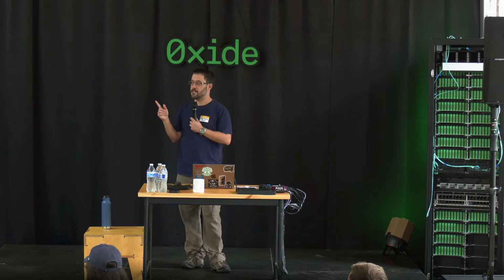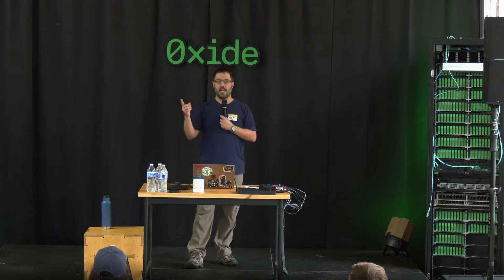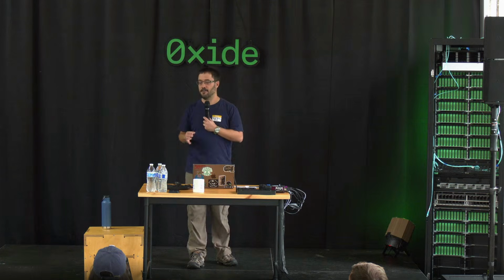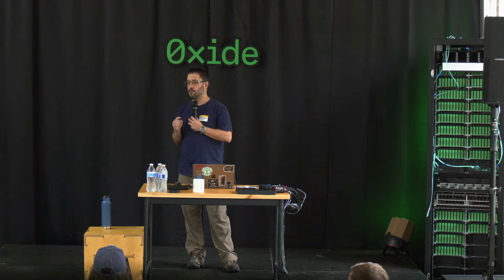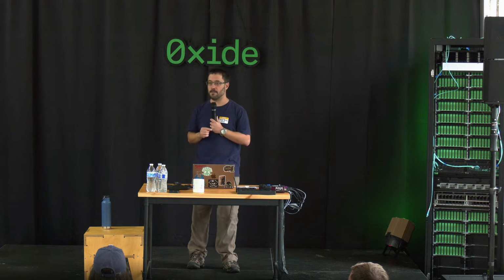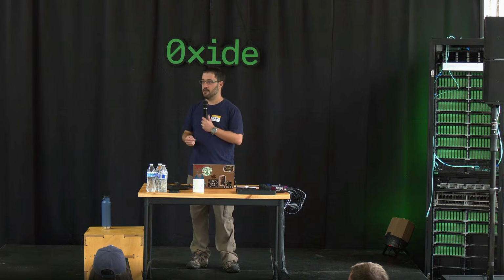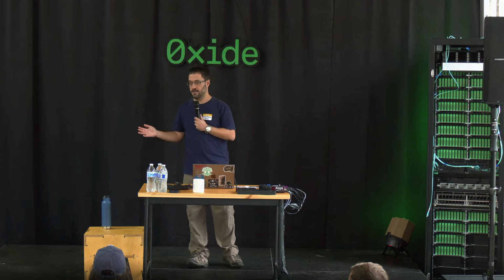Then we say, well, are those edge cases really important right now? And I'll talk about how we answer that question. If they are really important, then we just keep working on the design, fine. If they don't seem that important, then there's this question of, do we need to solve this right now? And I think an important distinction here is we usually do spend the time to flesh out what it would look like to fix this in the current design, because these edge cases can absolutely inform the architecture. And that's really important too.